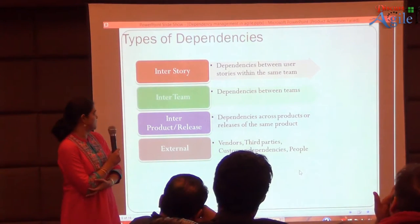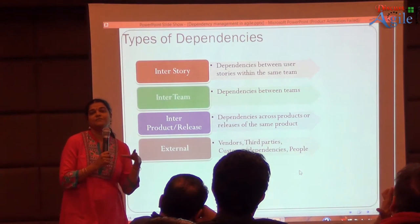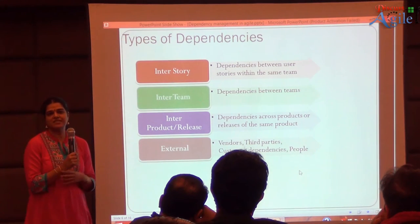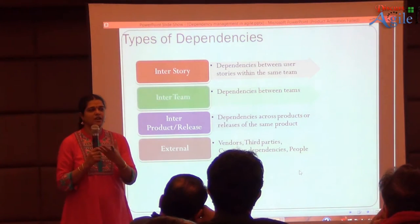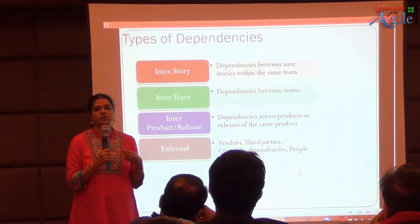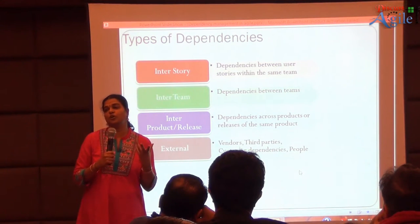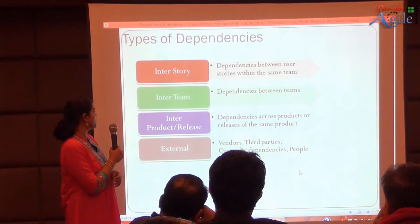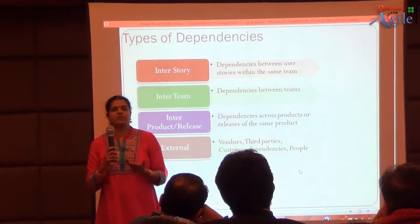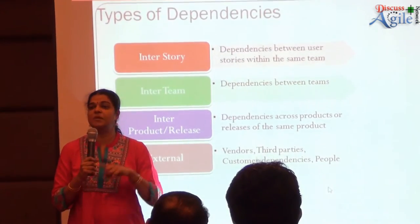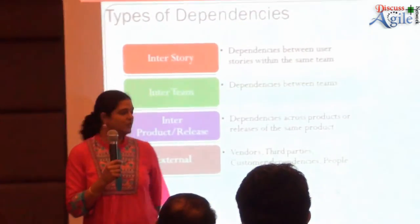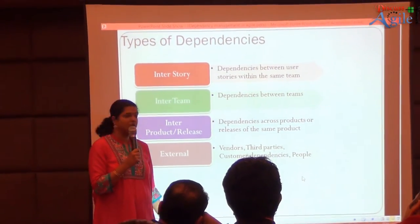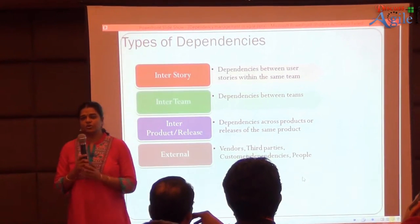What are the different types of dependencies? One is inter-story — dependencies between stories. Next is inter-team — dependencies between teams, where one story has a data dependency on a story done by another team, especially in bigger frameworks. Another is inter-product or release, where a team working on one product may depend on another product. And then there are external dependencies — vendors, third parties, customer dependencies, or even people dependencies.